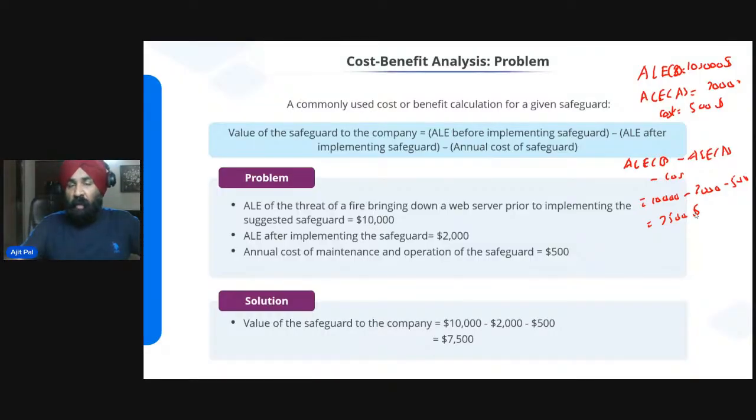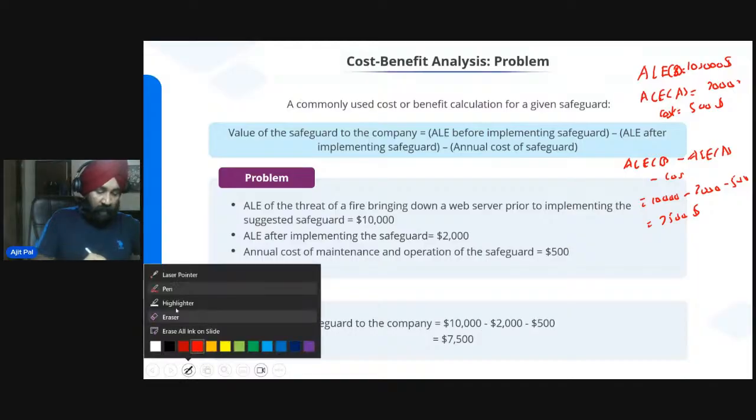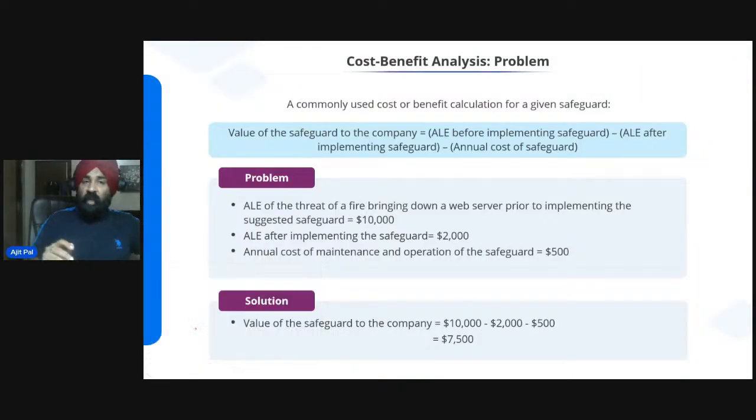So this is about your phase two. Till now, we have seen risk identification. The second phase we have seen is risk analysis. First we identify the risk, then we analyze the risk. Analysis of risk simply means identification of threats, vulnerabilities, likelihood, and impact, and then calculating the risk value. And on the basis of risk value, you will take a decision to respond to the risk.